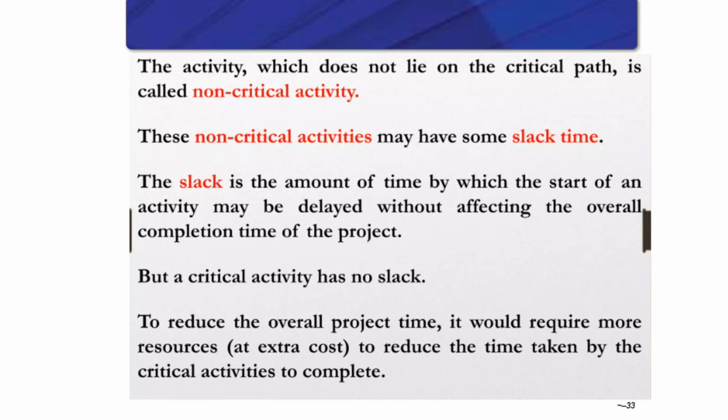A critical activity is one that can ensure the project finishes on time or uses resources very efficiently, an activity that has no slack time. To reduce the overall project time, that critical activity can do it. It would sometimes require more resources to reduce the time taken by the critical activity to complete.